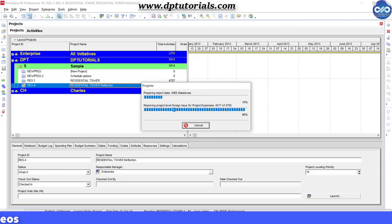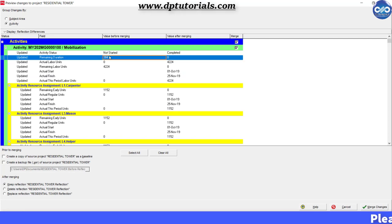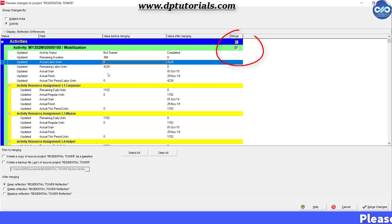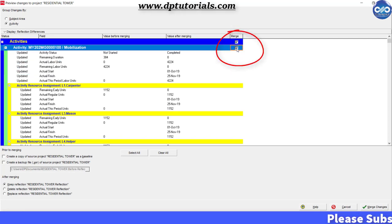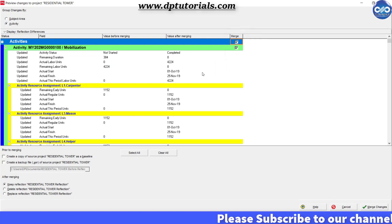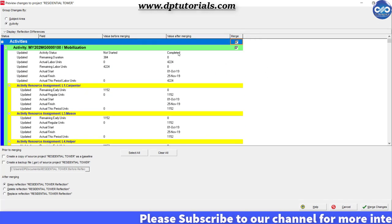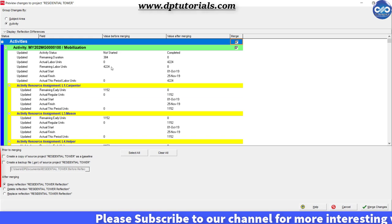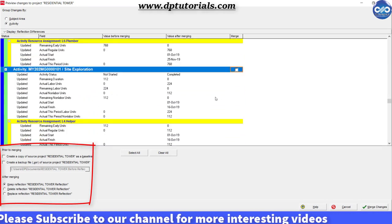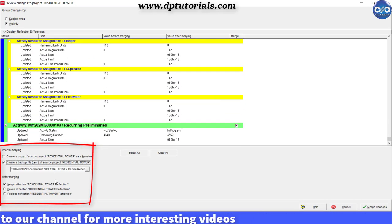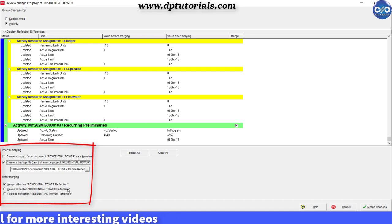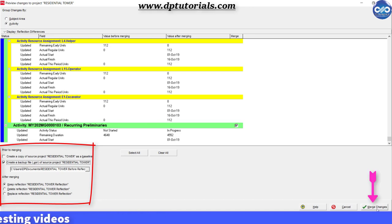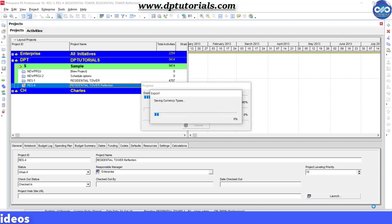You will get a dialog box with a preview of all the changes that you have done. You can select those changes that you want to merge with the project. Also, you can select the options to make baselines and backups of your schedules with these options below as per your requirement, and finally click on this merge changes button.